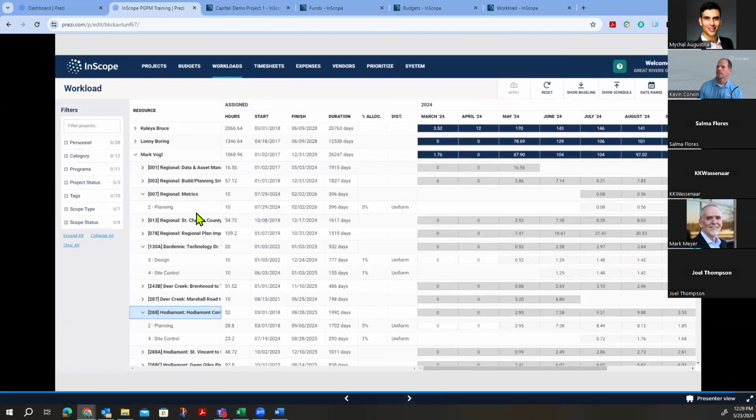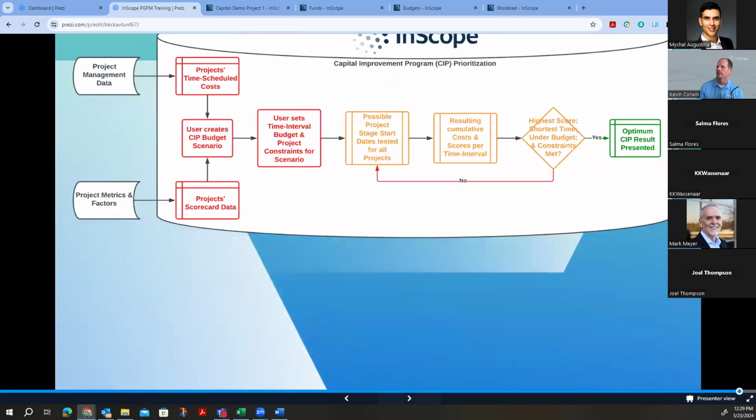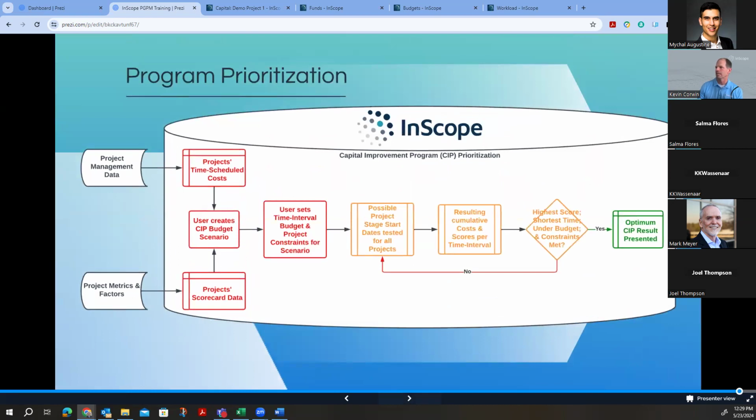And so I can do this, and the only thing I have to edit, it's not immediately apparent, is at these stages of every project for every person. I just come in here on a quarterly basis and put in some percentages, roughly what percentage of that person's time they're going to spend. That's the only thing I have to do to get this data. Everything else is automated, so it makes for a very clean and easy way. And I've done this with some organizations and they really like it.